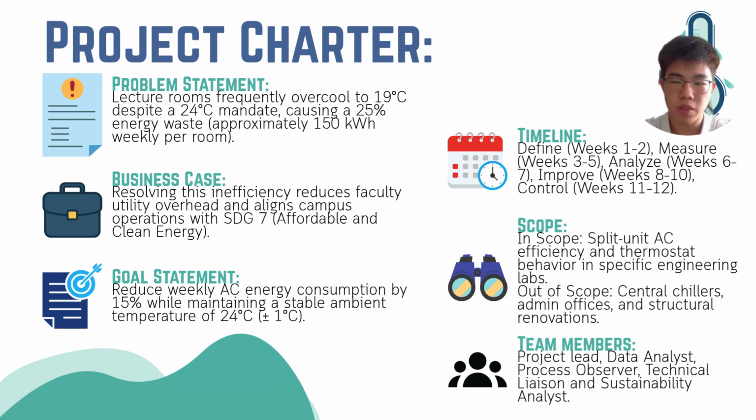The in-scope of this project is the split unit AC efficiency and thermostat behaviors in specific engineering labs. The out-of-scope of this project is central chillers, admin offices, and structural renovations. The team members in this project include the project lead, data analyst, process observer, technical liaison, and sustainability analyst.